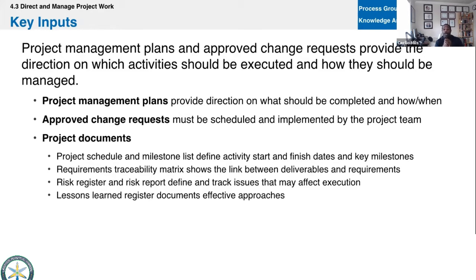The only thing that's part of your project management plan are your hows, your subsidiary plans, and those 3 baselines. The scope baseline, WBS dictionary, scope statement. The schedule baseline, that sort of summary schedule, right? Not the project schedule. That's the detailed one we use with the team, but the summary schedule. And then the cost baseline contains contingency reserves. That's the only thing that's part of the project management plan.